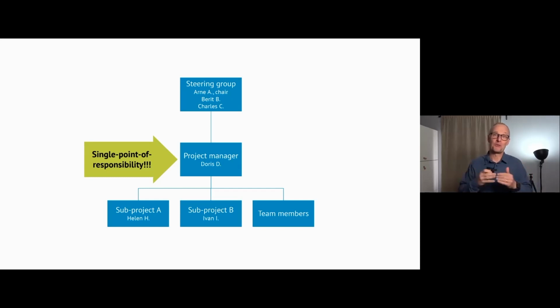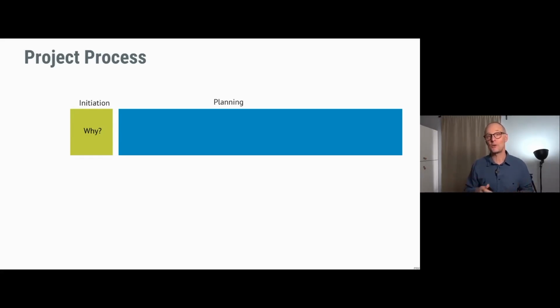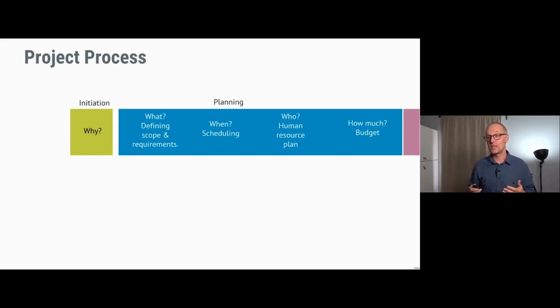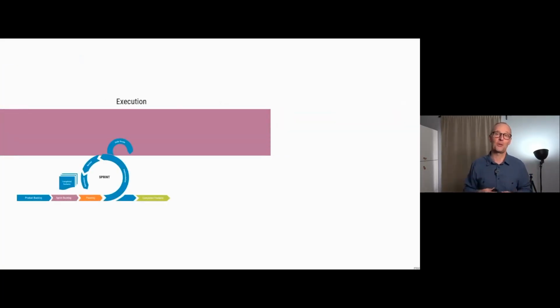So what about the process of going through a project then? This is one of the last things to say about project in general. Usually projects start with some kind of initiation, and then there is a planning phase, and these are quite generic terms still. You go into an execution phase where you then create the deliverables, and you might even run some agile methodology or project management as part of that, such as Scrum, and that's perfectly fine if you have software or other deliverables that are appropriate to deliver incrementally. And then you close out your project and you enter the maintenance phase or the production phase, which hopefully is going to be many, many years from that day, and you're going to sell a lot of your medical devices.